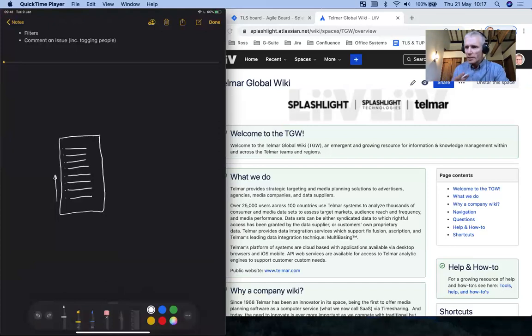We're not going to waste our time putting a lot of attention into speccing and understanding this item at the bottom of the list, or even these items down here, because the fact is we're not going to be addressing those in the next short cycle, in the next sprint. The fact is that by the time we get to those, the whole requirement might have changed. So we're just not going to waste our time working a great deal on those.